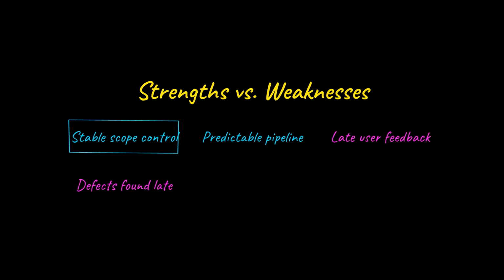Managers, budget owners, and auditors all valued waterfall for the same reason. It made progress visible. Deliverables appeared at defined checkpoints, and every requirement could be traced through design, code, and test. That discipline was a natural fit for the engineering culture of the time. When requirements are stable and well understood, waterfall produces reliable, well-documented results, which is exactly why regulated industries like aerospace and medical devices still use it.